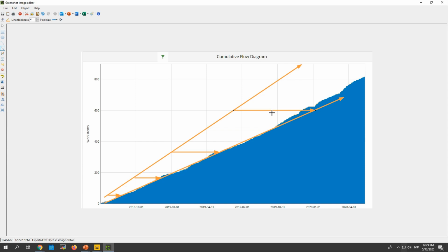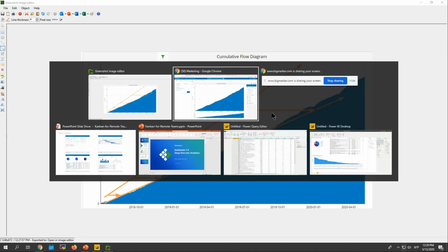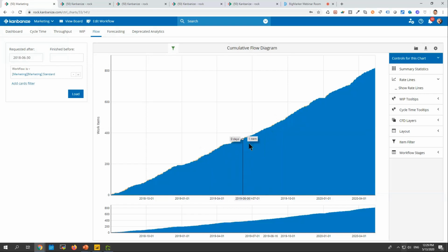So that's why we actually use work in progress limits in Kanban. If you have a team that has limited the work in progress, then you see a chart like this. The WIP never grows, cycle time is stable, it just works perfectly well.